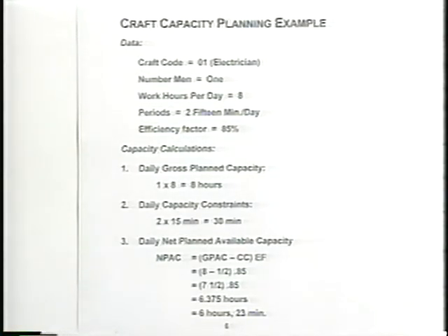One of the things that I didn't mention before, but I want to bring it up now, because this would be the appropriate time: never use the term inefficiency factor. And you notice the way I've identified this here as an efficiency factor, even though it's below 100%. That kind of takes the sting out of one being efficient and one being inefficient.